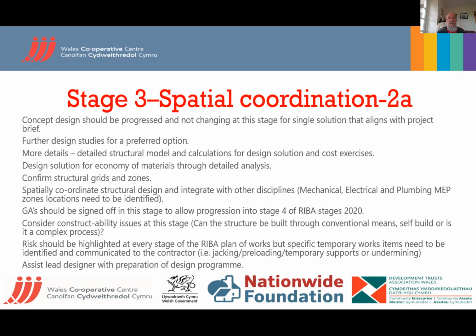Yeah. It's basically outline planning, if you like. Stage 1 is sort of the concept, the general idea. And then stage 2 is the outline of how that general idea might come to fruition with blocks of groups and massing and whatever. And then you go into more detailed spatial design, how things work and fit together into the local environment, and get the details more fixed.